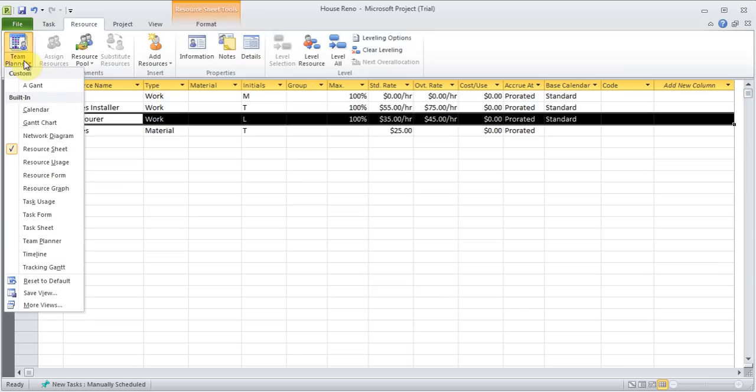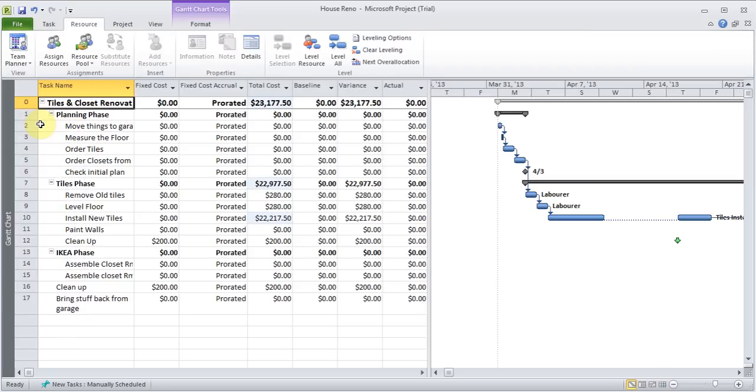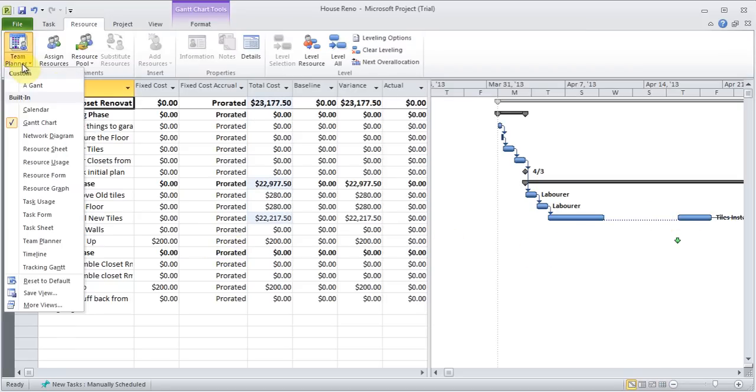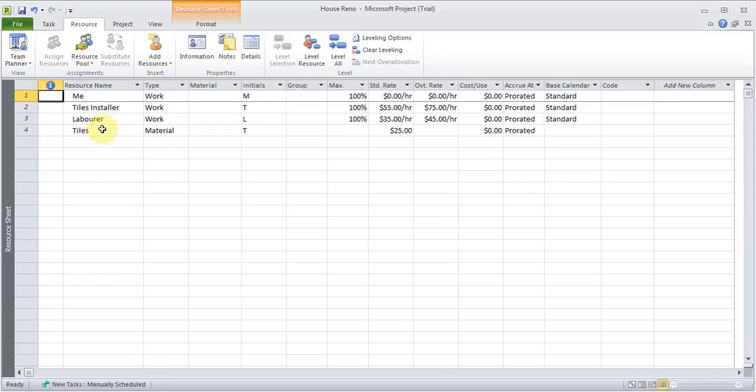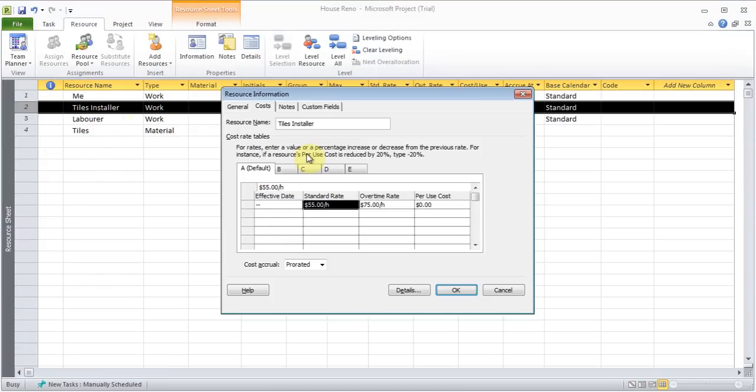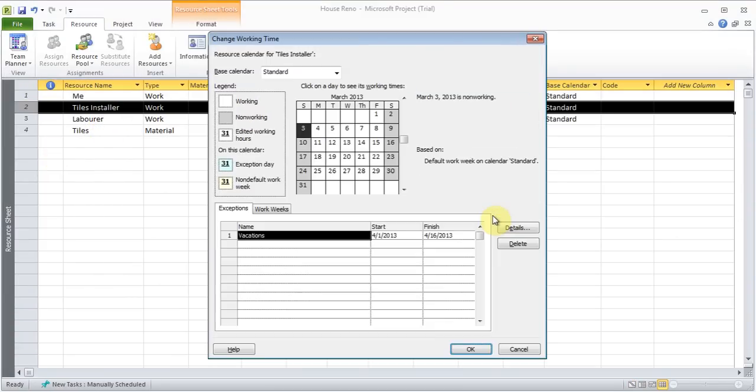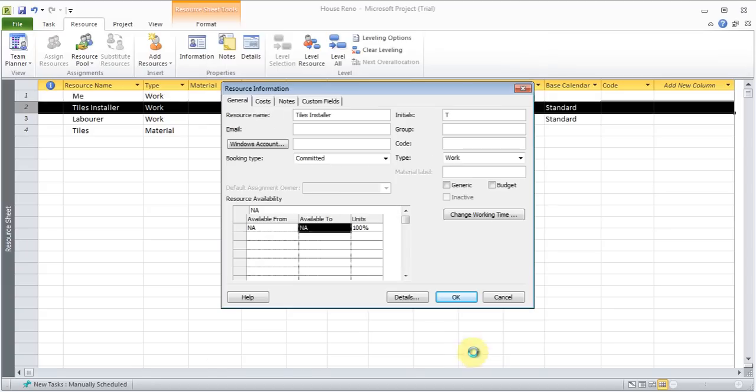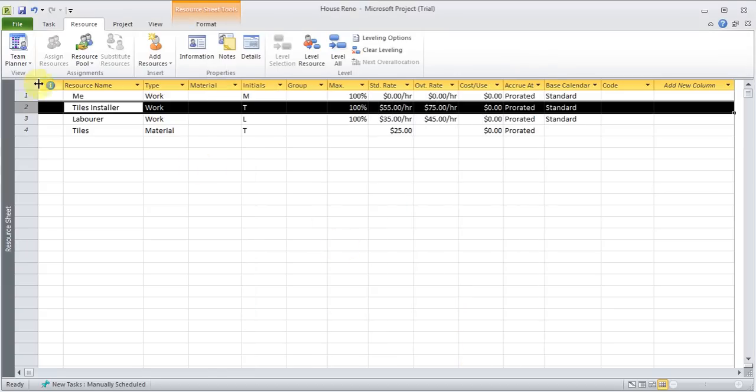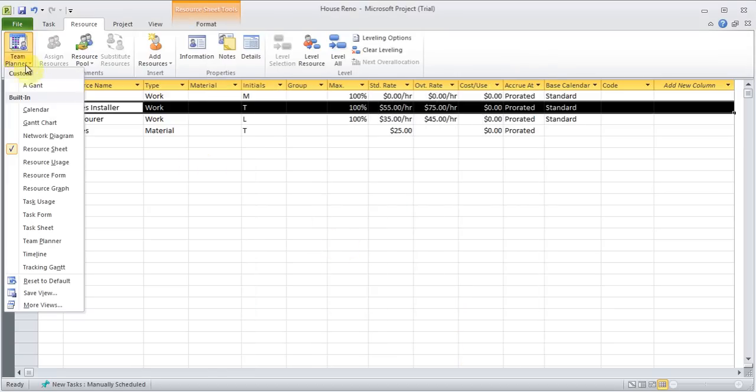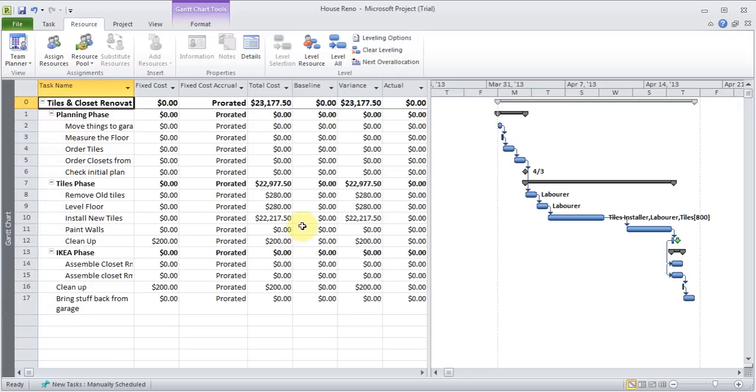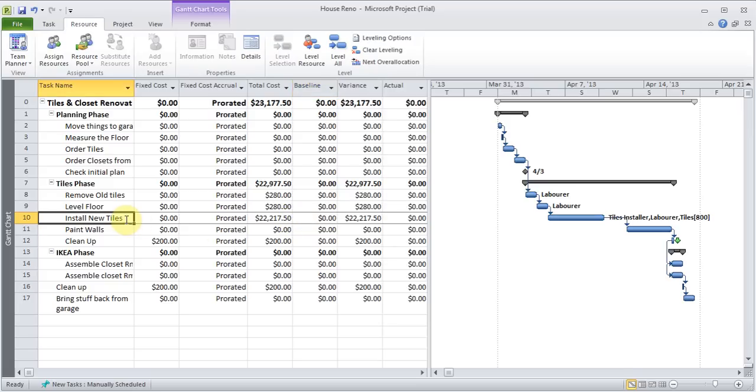So now those rates will apply. After that date. That I put in there. So I can now come back. To Gantt chart. Oh. I need to remove that thing again. Come back to resource sheet. Double click on tiles installer. General. Change working time. I need to delete this. Click OK. And come back to Gantt chart. And this would have changed. Based on the new rates that I've added. For the laborer. Because he's working beyond that date. So he'll have different rates at different times.